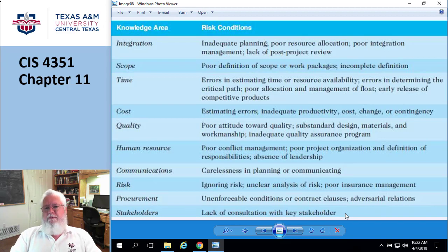And three-quarters of the way through my development, I find out that someone else has just released a similar product. I didn't know it was coming, and now I'm in competition. So the risk at the beginning of the project versus the risk in the middle, you have to go through this process iteratively to see if your risk has changed.